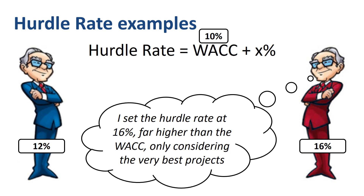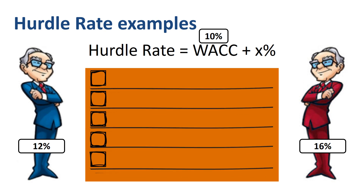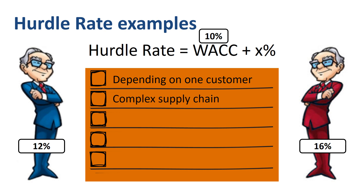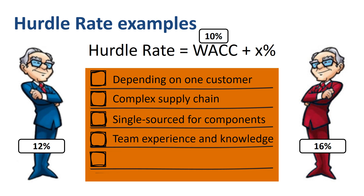Some CFOs set hurdle rate levels in a somewhat arbitrary way; others use a more structured approach. The hurdle rate describes the appropriate expected returns for the level of risk that is estimated. Riskier projects generally have higher hurdle rates than those with less risk. Items considered risky include: depending on one customer for sales, operating a complex supply chain, being single-sourced with just one supplier for key components, a gap in team experience and knowledge, or intense competition in the market.